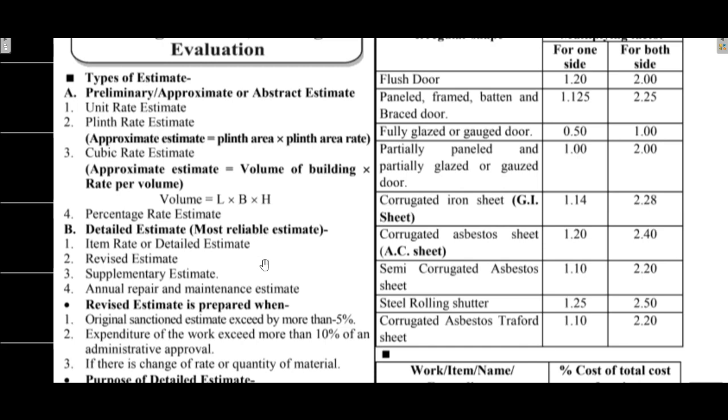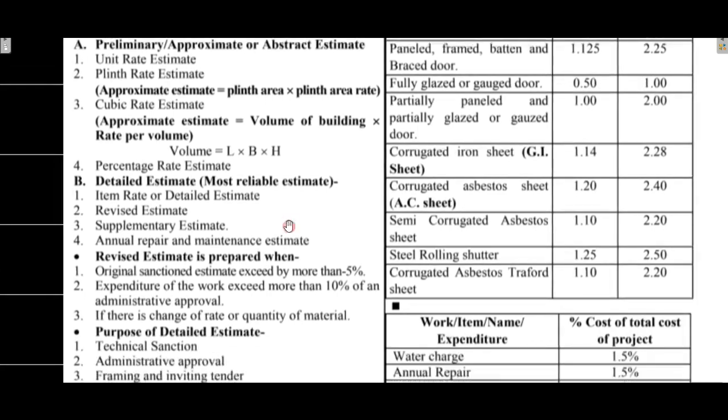Now we have the detailed estimate. Detail estimate is the most reliable estimate. It includes item rate estimate, revised estimate, supplementary estimate, and annual maintenance or repair estimate.